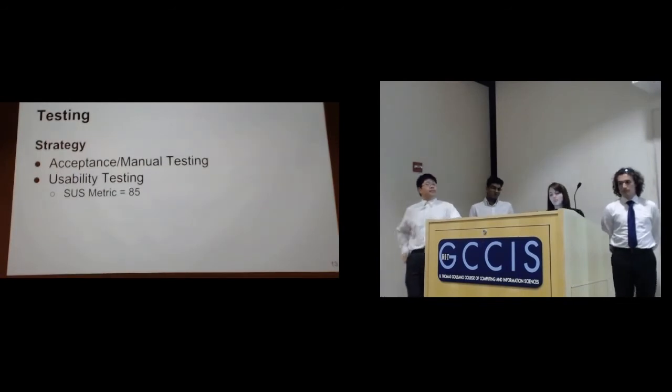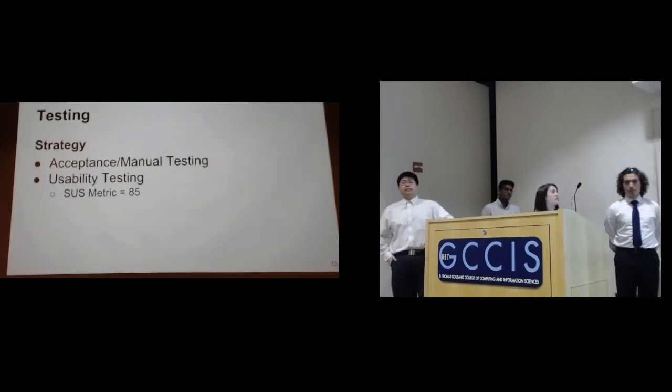Okay, so now we can talk a little bit about the testing that we did for this application. Like Akshay said, usability was one of the main quality attributes that we looked for. So we did a lot of manual testing and user testing. At the end of each construction phase, we created test scripts and gave them to employees at Trillium that highlighted the features we had just completed in the previous construction phase.